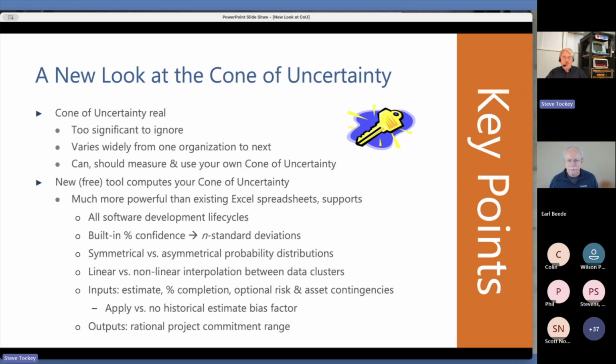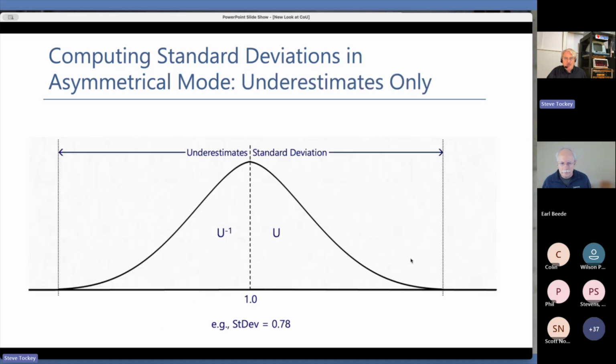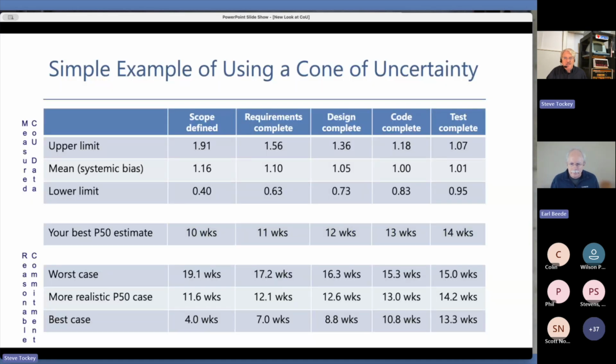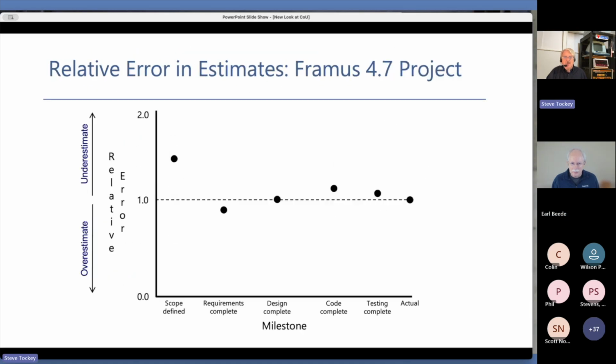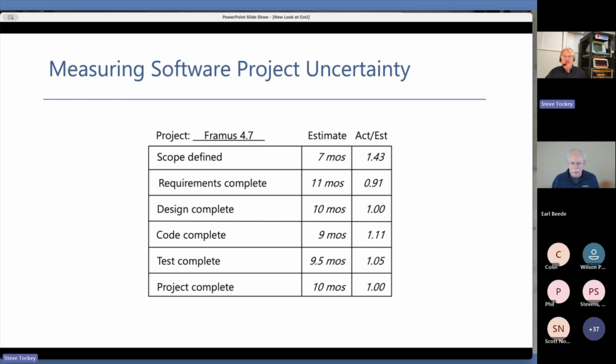So we didn't talk about what data needs to go in very much detail, but let me just point out the data that goes in needs to be some measure of, at some point in time, what did I estimate, in some unit, and what actually happened in the end? And those units, if I'm doing design to cost, it's going to be some measure of scope or something like that. It's going to be my unit if the budget is fixed. Usually scope's going to vary, maybe schedule, but usually scope.